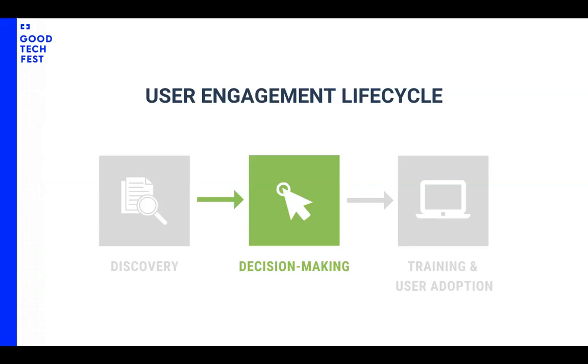Yeah, that's definitely something that we also recommend mostly, is to do a phased approach when that's possible. Exactly for the reasons that you said, because if it's complex, you can break it down. If it's going to be a big lift for user adoption, then having a phased approach is a good way to start introducing users piecemeal to the new functionality. And of course, it's a way to level out the budget that you're spending.